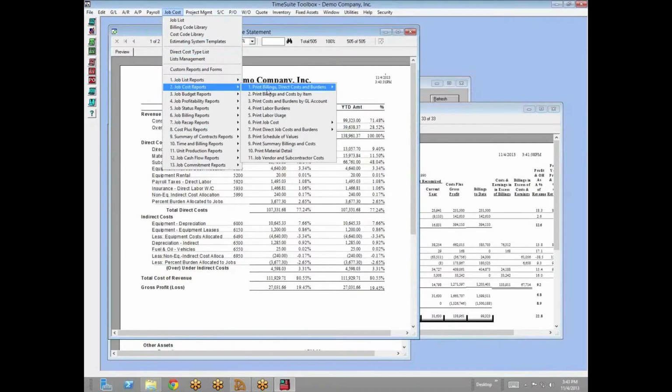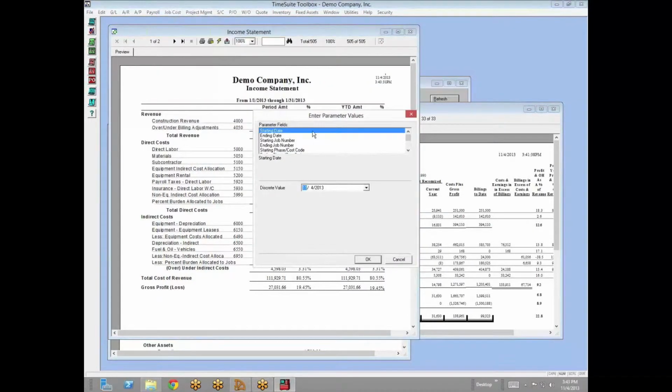All the job cost reports in the system are based on the work date on the time card, which is the preferred method. Some of the systems we compete against basically shortcut that and use reports that use the check date to tie into the job cost reports. All systems will post payroll checks as of the payroll check date, and then only some systems will actually accrue wages for you. And accruing wages is one crucial component to tying it out perfectly.